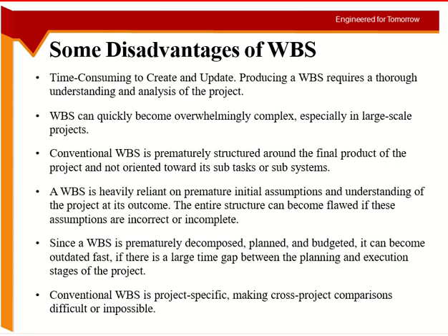In the conventional, traditional approach, you are looking at the final product and what we need to achieve the final product. So there's a chance that you may miss important tasks. You say, I want to construct a building, it needs a superstructure and a substructure, and that's it.